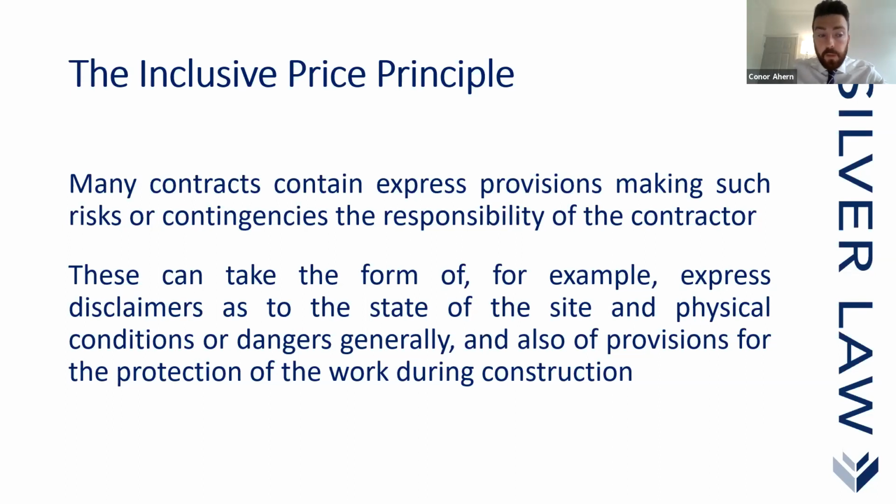And obviously, as I was saying earlier, in schedules of amendments prepared by the employer, he's going to look to make the ground conditions a responsibility of the contractor, and that's invariably what most clauses state. Also, another clause that's included is a reliance clause. So basically, where the employer has gone to a ground specialist or a geologist, they may have completed some boreholes, they may have completed a borehole log.